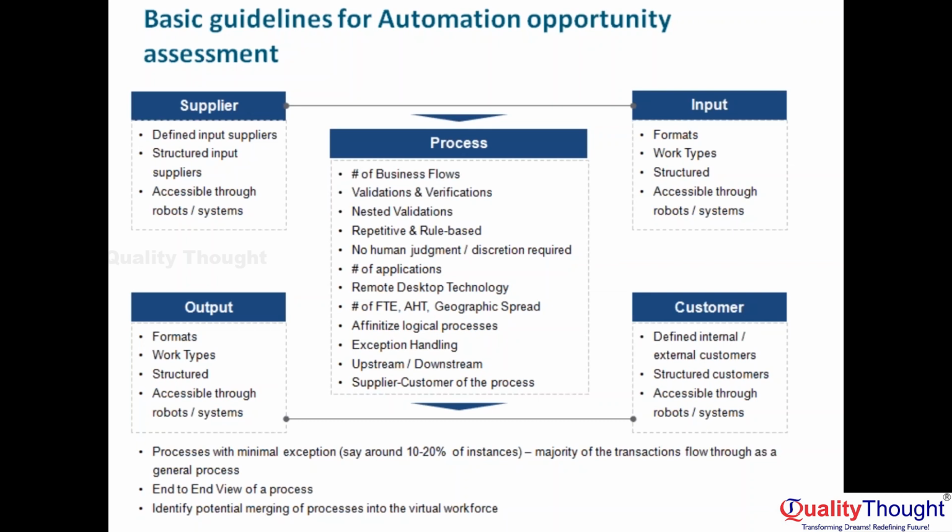Okay. So before we close the session, what is the RPA life cycle? Discovery phase, design phase, build phase, UAT, go live, support. What is the purpose of the discovery phase? Applicability, complexity, benefits. What inputs do we need? SIPOC and data collection template. Who is involved in it? Process architect. He will coordinate with the technical architect.